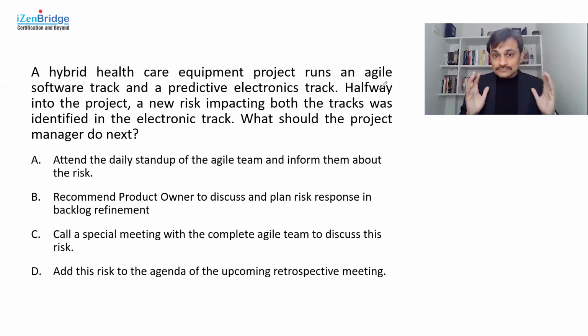Yeah. So my opinion, if the risk impacts the current iteration, you better handle it then and there, maybe after the daily scrum. But if risk is impacting the future course of action, then backlog refinement seems to be the most appropriate place to talk about it. So I go with option B. I can see this one is having very close choices.